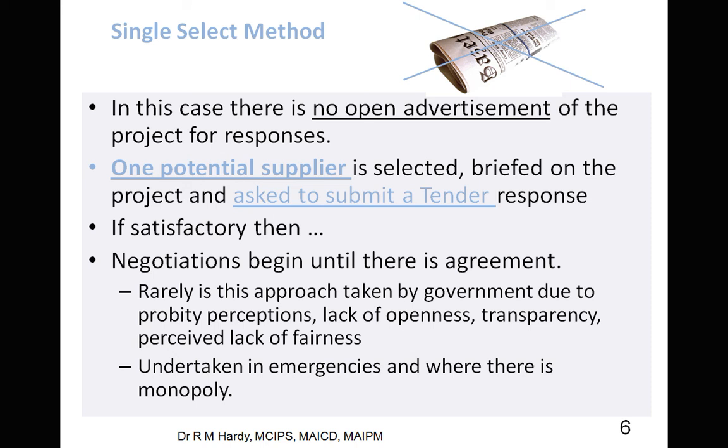And the way architects act in this, is it driven by a code of conduct more than law? It is also driven by law. Because when you run a tender, essentially you are entering into a contract with the tenderer that things will happen in a certain way. And if you don't do it in that way, then you're going to get into strife, and they have grounds to come back at you for being treated unfairly.